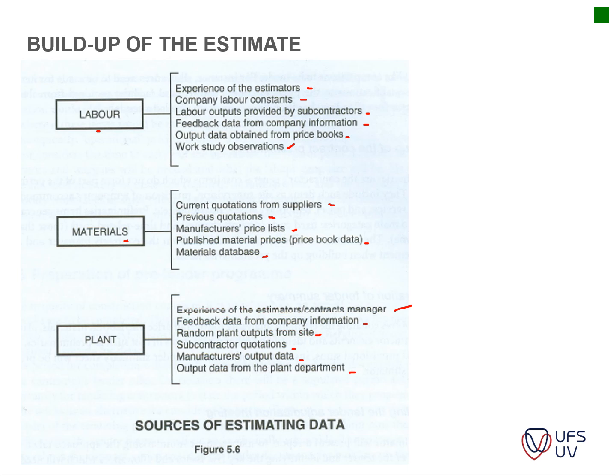Your schedule is very important for your plant calculation, because again your plant is divided into a rate per hour or so, which is then converted and compared to your schedule on how long you will need that specific excavator on your site.